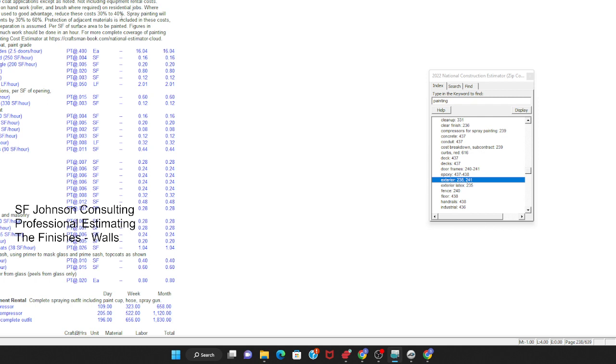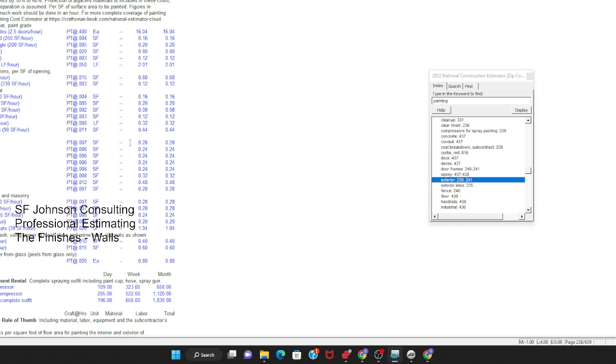And this is just the labor, not including the paint and everything, just the labor, right? So exterior surfaces per coat. Okay, so you're going to times it by what? 3. You're going to times everything by 3, because you're doing 3 coats. Keep that in mind. These cost 0.004 would be 0.012 for a ceiling per coat. So keep that in mind. And they assume that you can do the ceiling 250 square feet.